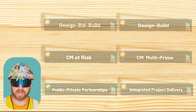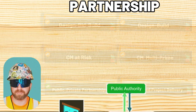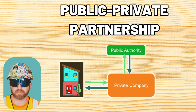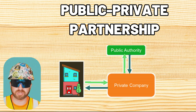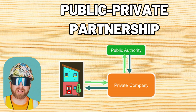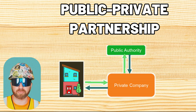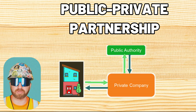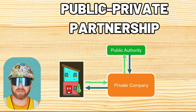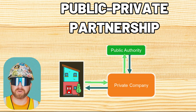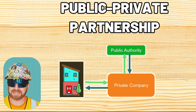The next method is Public-Private Partnerships or P3. A government body — such as a city, state, or federal department — works together with a private company to facilitate completion of a project, whether a toll road, municipal water facilities, etc. These projects are still owned by the public through the government but are managed by private companies through these partnerships, based on knowledge, experience, and efficiency. Private companies are driven by incentive-based goals to perform well, which ideally creates a win-win scenario for the government, contracting entities, and the public.